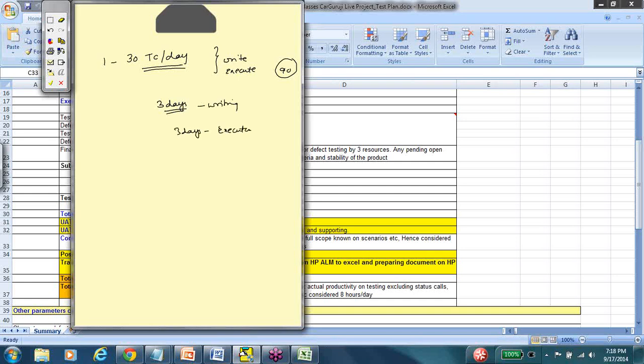Now, when we plan this way, this is always very aggressive, I would say. Why is it aggressive? Because we are planning exactly based on how much we can write. But there are always contingencies. There are always unexpected issues or situations that come up because of which we might not be able to stick to the plan.